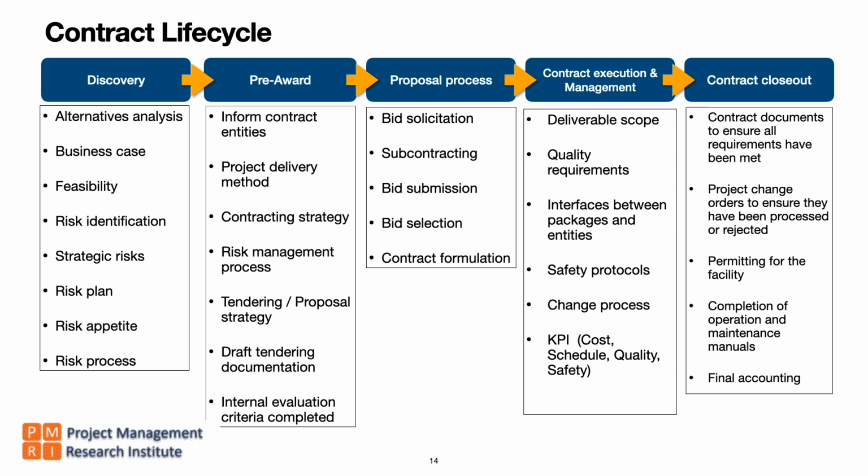And then we get into the contract execution mode and contract closeout modes. So discovery, pre-award, award, contract execution and management, and contract closeout is the typical life cycle of a contract.